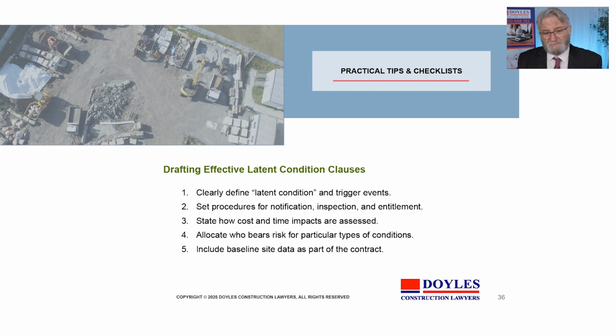The other aspect about latent conditions, if one's running a major project, is to perhaps put baseline site data. Running a major pipeline, why don't you specify what is the expected condition throughout the pipeline? And then as you proceed along the pipeline, you measure the condition by agreement, and the adjustment to the contract price can be made.